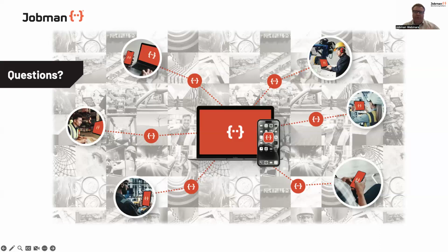So when it does the final reporting and say we estimated $20,000 of materials, we thought based on our margin that we'd be able to buy or source them at about 15 grand. So we should have made about 5 grand there. As it turns out, we only made 3.5 because we had to pull $1,500 on additional materials that we weren't expecting. So that absolutely is one of the primary benefits of the software: you can take advantage of that information and then use this process to really get far better and more accurate understanding of where your waste centers are in your business, which then in turn can lead to process improvement, which will improve that profitability.